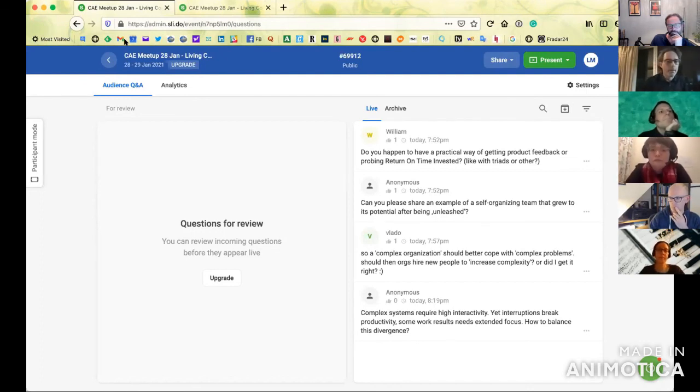Sprints themselves are enabling constraints as well for teams within Scrum. They enable the team to learn how to deliver a piece of software in 2 weeks, essentially, or in whatever length that is. And if they don't learn it, they iterate on it and keep trying, and eventually they will learn it. But it's the two week door, the whatever week time box you've got, that is the constraint there. And if they have stories forced upon them into that sprint so that it blows, they're not going to learn it. It no longer becomes an enabling constraint. It's a bit weird.